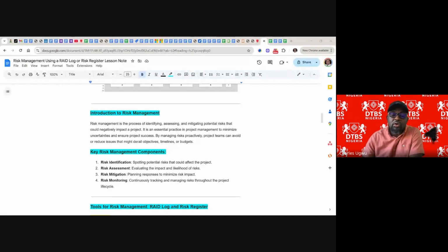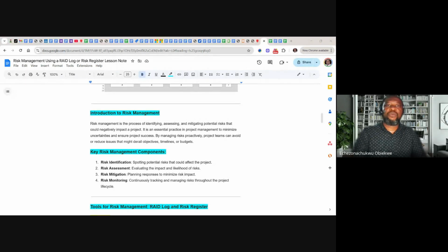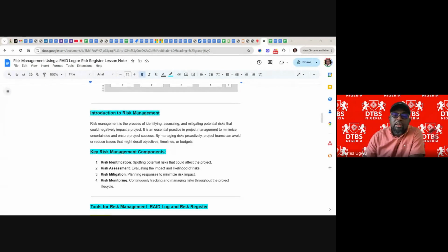So I want other people, okay, Eche, can you give us any example of a risk? Okay, we can say the Israel-Iran war currently ongoing is a risk, because it could have impact on the project. If there's a component for your project which is being shipped and it has to pass through the Mediterranean Sea, then automatically it's in danger at the moment because it might not arrive in time. Yeah, okay, that's good.